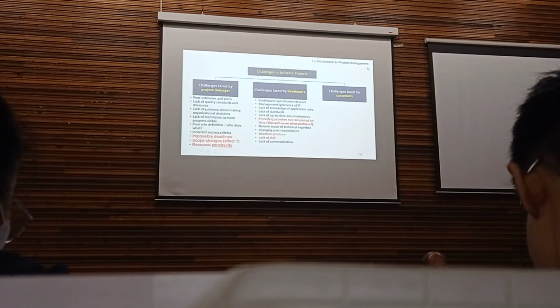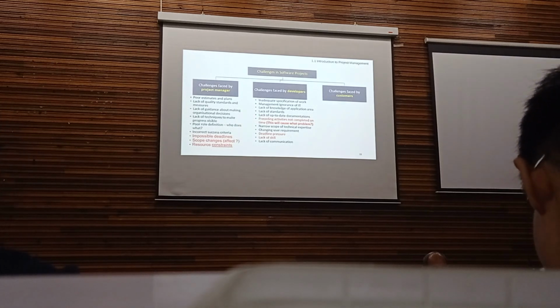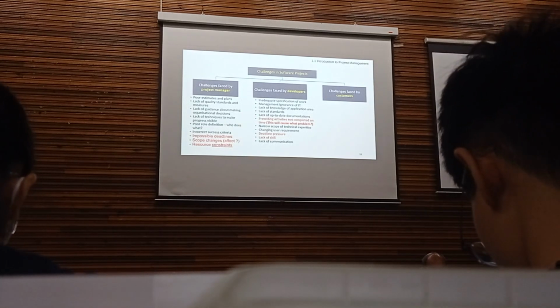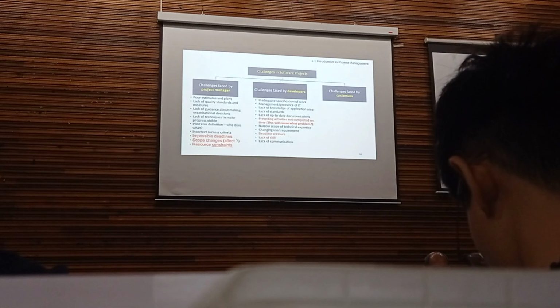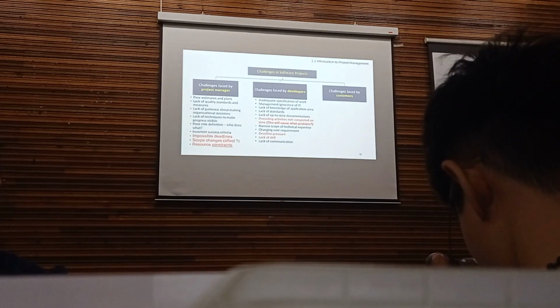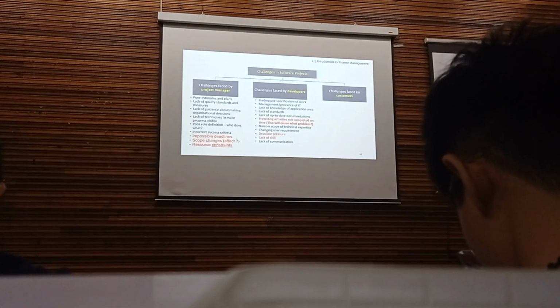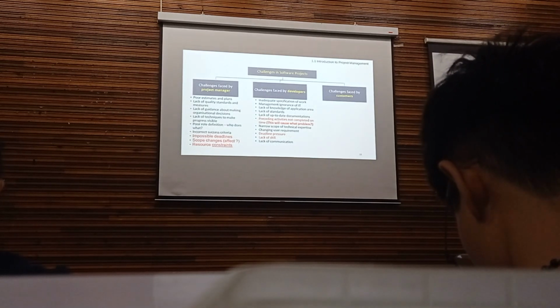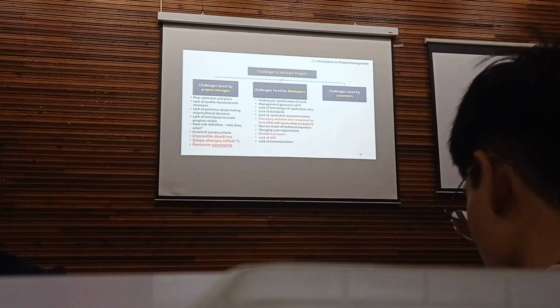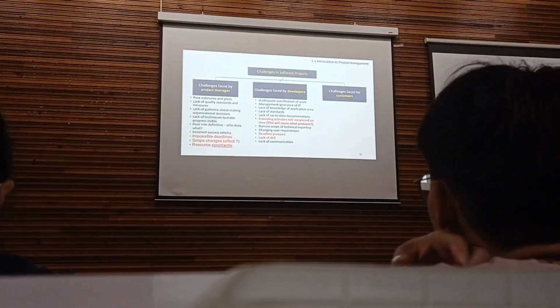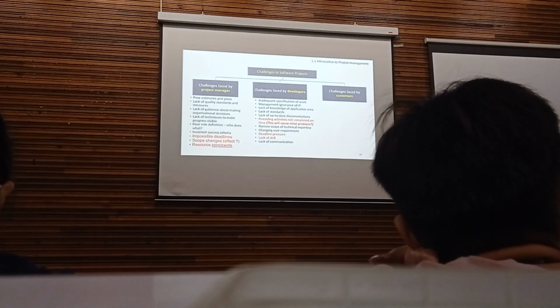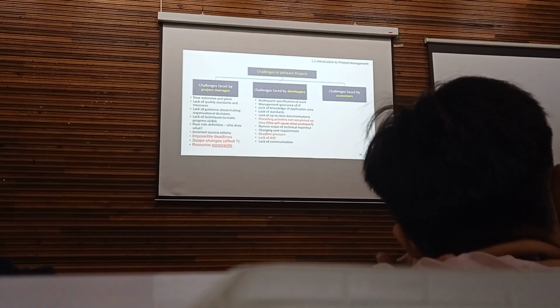So for developers, what are the challenges? Preceding activities not completed on time. So this will cause what problem? The second diagram. Task 1, 10 days, task 2, 10 days. So this one should start after this is completed.